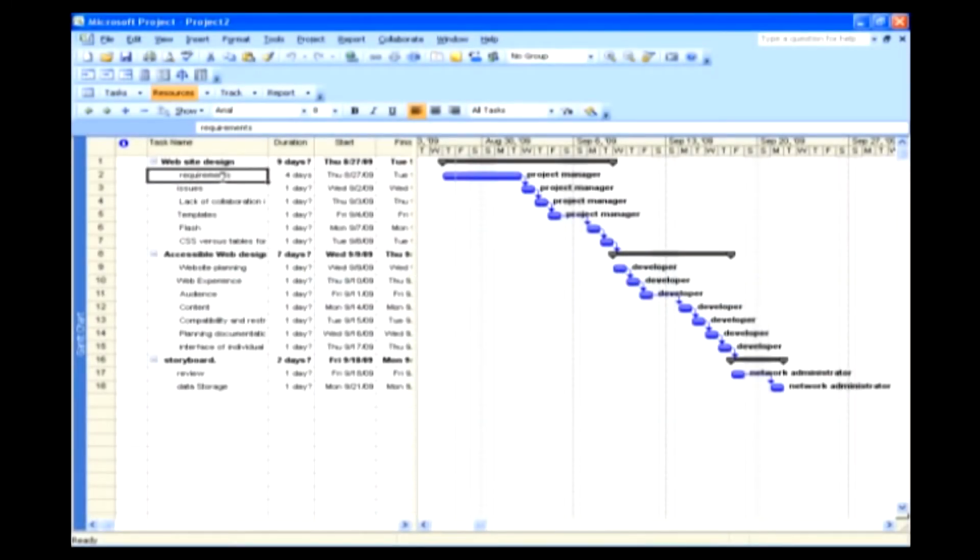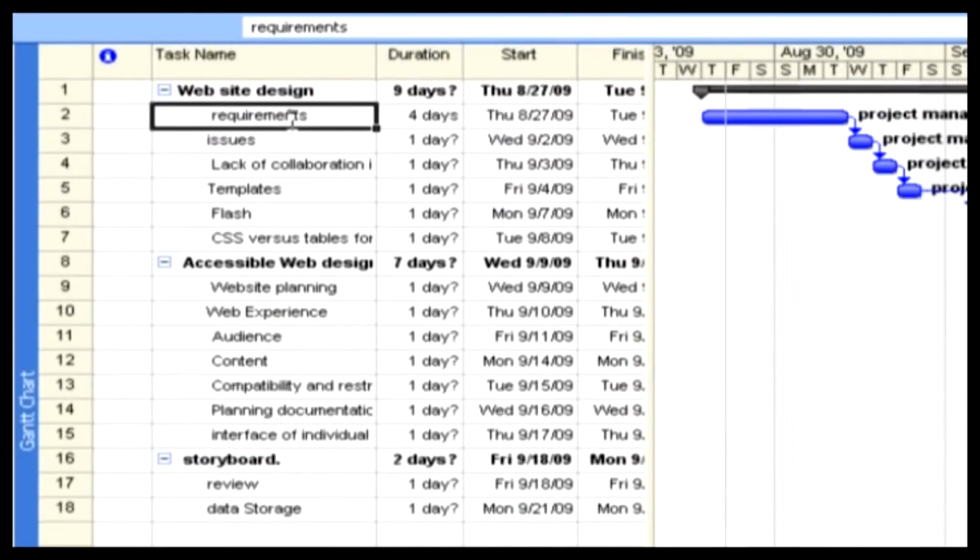Assign a calendar to a task. Calendars are what Microsoft Office Project 2007 uses to schedule our project. Typically, calendars are assigned to resources so that Project can track when resources are available to work on tasks to which they are assigned. By default, tasks are scheduled based on the project calendar. To define unique or specific exemptions for working time and non-working time, we can create a task calendar.